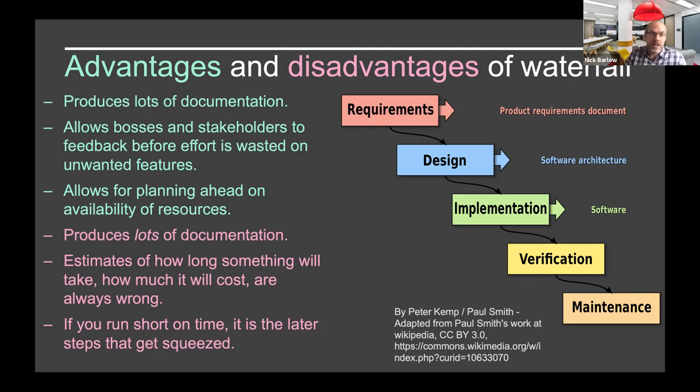There are disadvantages as well, though. One of them is the same as the advantage. It produces a lot of documentation, and probably a lot of this is never going to get read. Probably a lot of it will be obsolete by the time the project's done. And it's just a drain on resources to produce, read, verify and check all this documentation. Probably the more important and crucial one is that any estimate you ever make in advance of how long something's going to take, how much it's going to cost, how many people you need for it, and when you need those people, is going to be wrong.